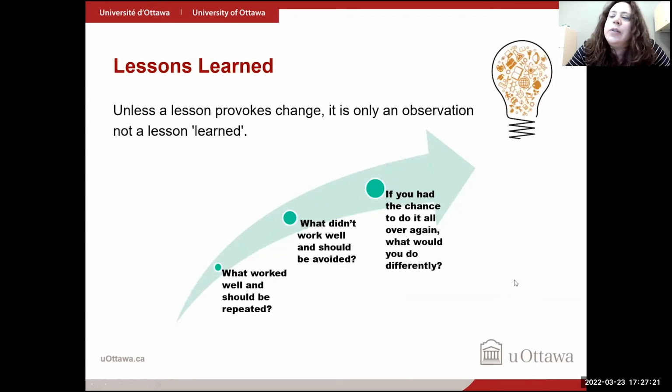So when you have wrapped up your project, or you're in the closing phase, I think it's important to get all players of the game into one lessons learned session. These can vary anywhere from a couple of hours of a meeting to a full day event, with every player of the team, from design, from any audio editors, your subject matter experts, and anyone that was involved. You want to hear from everybody's perspective at the same time.